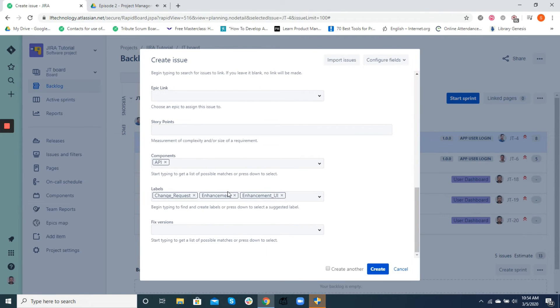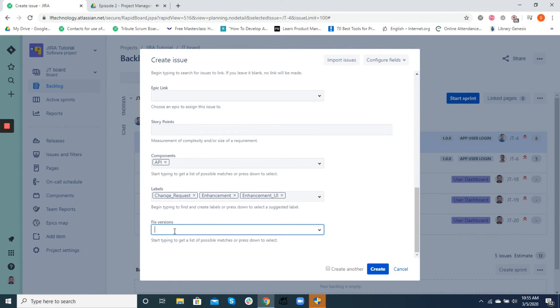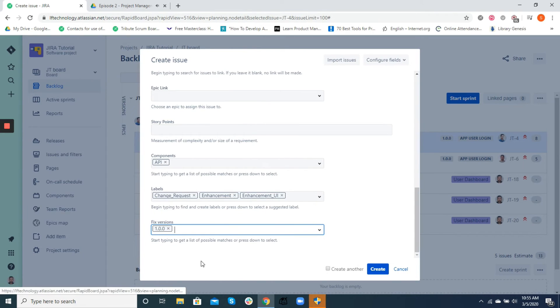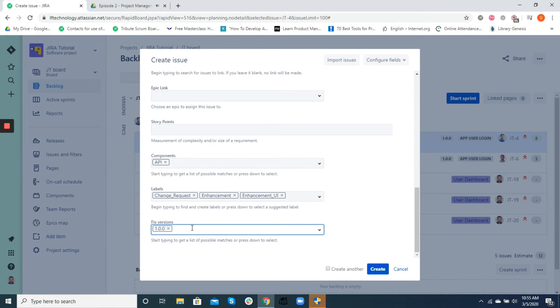Any task that is completed for a production release should have a fixed version. Fixed version helps to identify in which production release the ticket has been deployed. We normally use standard release conventions such as 1.0.0 while adding or updating fixed versions, which should also be the same as your git releases.